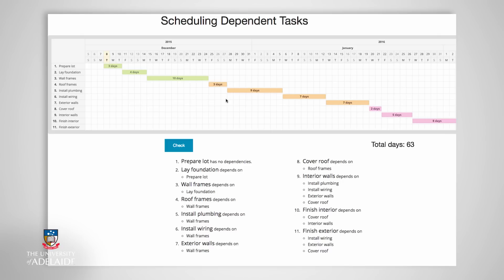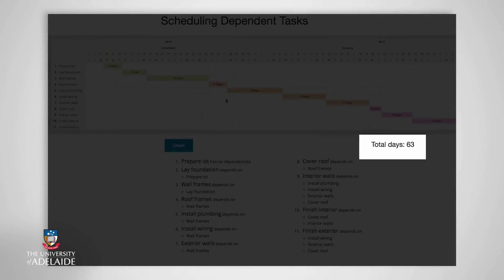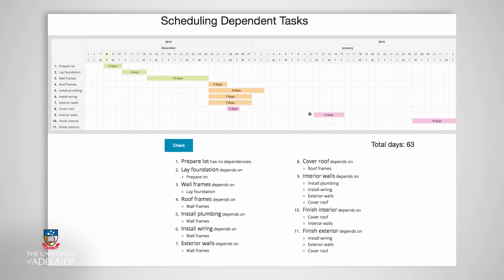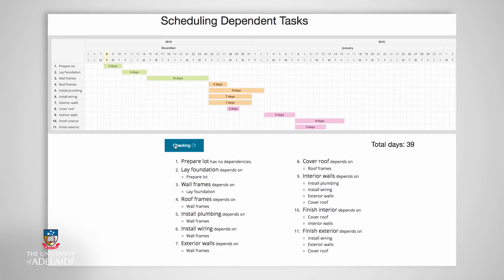Now that you have had a go at preparing your project schedule, let's take a look at the optimum way to put the schedule together. As you can observe, the initial 63-day schedule has now reduced to a duration of 39 days. It is worth noting that the individual 11 activities are still the same duration as before. The reduction in days is the result of sequencing activities in the schedule.